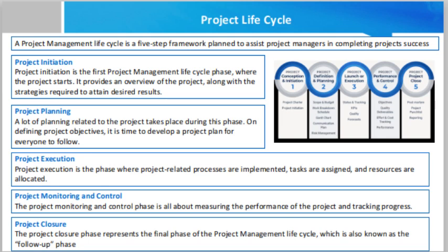Undertake a feasibility study. In the initiation phase, it is essential to understand the feasibility of the project. See if the project is viable from the economic, legal, operational and technical aspects. Identifying problems will help you analyze whether you can solve issues with appropriate solutions. Identify the project scope. Identifying the project scope involves defining the length, breadth and depth of the project. On the other hand, it is equally essential to outline functions, deadline, tasks, features and services.